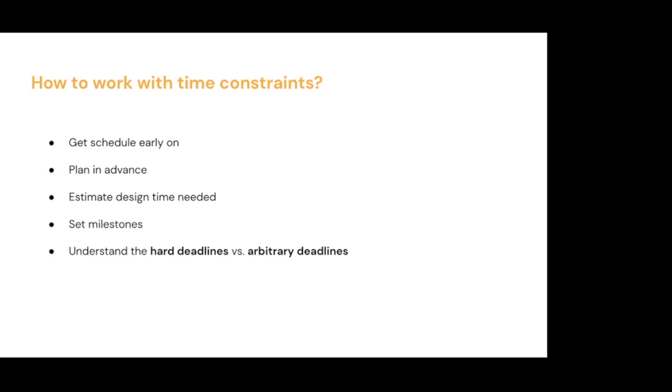So it's about understanding the schedule, understanding when each task needs to be done, and setting milestones, which could also be helpful. You might say, okay, if I have only 2 weeks to design and I'm doing all the research myself, I might budget the first 3 days for doing the research, and then for 2 days I'm going to start drafting ideas, or whatever your design process is. Setting milestones for yourself is good.